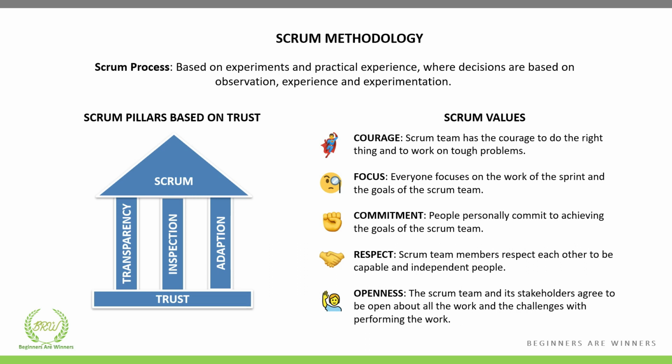And the first pillar of Scrum is transparency. All aspects of the project, for example, all the work being done, progress of work, any risks or impediments in work progress and completion must be visible to all project stakeholders, including the project team and product owners. How it is done is through the Scrum board, wherein all the work items and progress are very much visible to everyone. Progress, on the other hand, can be tracked through burn up or burn down charts or other shared visuals, which I will share later on.